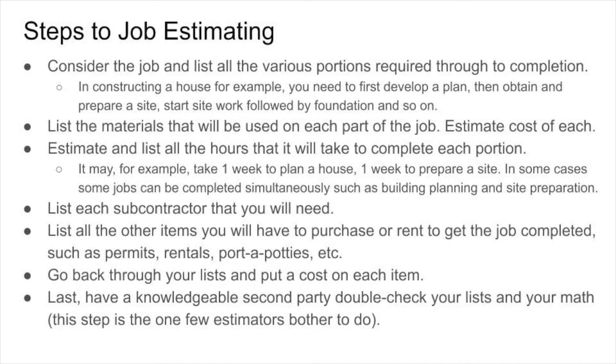So break the task into its various parts. The list of materials that you're going to be using. Again, with experience, you have a much better handle on doing this sort of thing, but you really need to be able to consider what are the basic materials that I need to do a job. How much of something am I going to need? How many gallons of paint? How many paintbrushes? How many rollers? And the costs would flow from that.